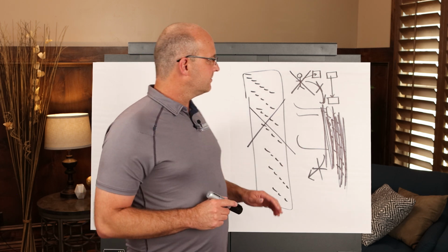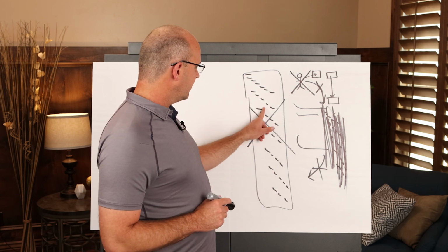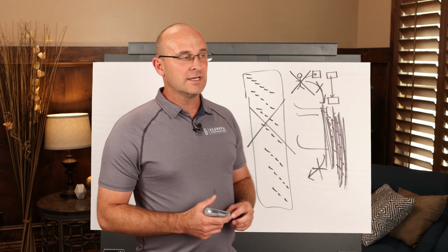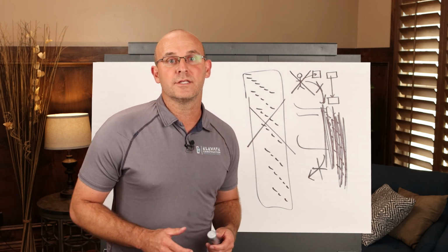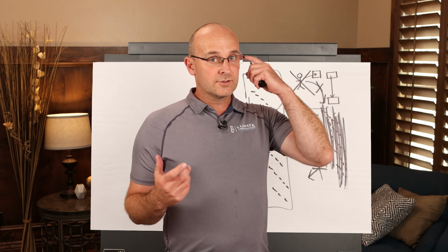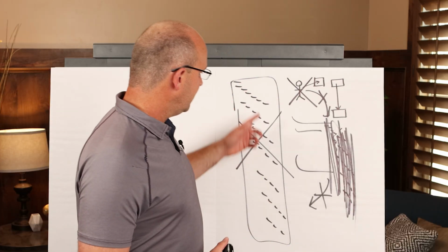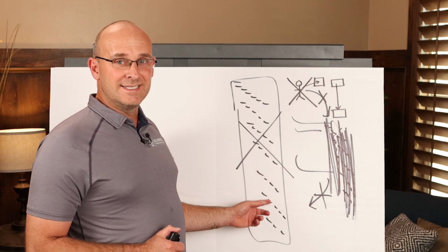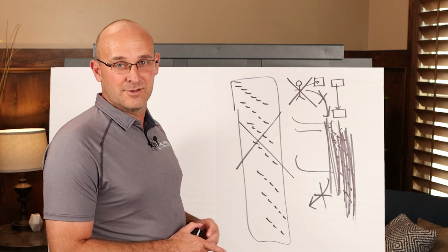So one of the biggest problems that I have is that people will blindly follow this because they're like, oh my gosh, that activity is down to the day. It must be accurate. In fact, some clients out there in the industry are like, oh my gosh, I got this 50-page schedule from our contractor and they're submitting on this project. They must know what they're doing. No, if you see a scheduler or a superintendent or a PM making a detailed schedule in the proposal phase, you automatically know they have no idea what they're doing.